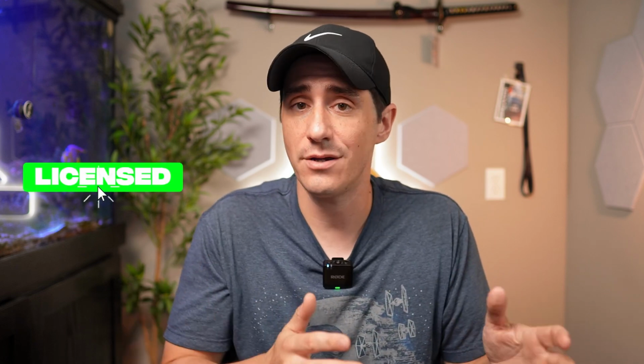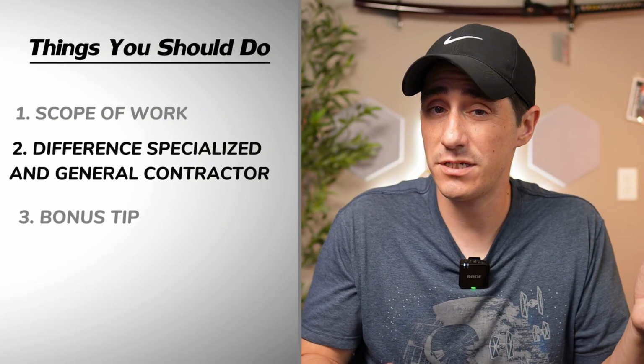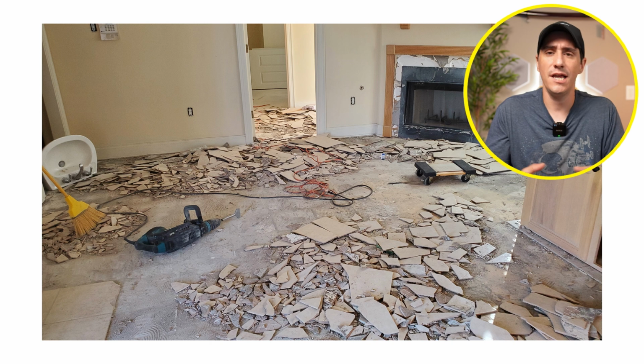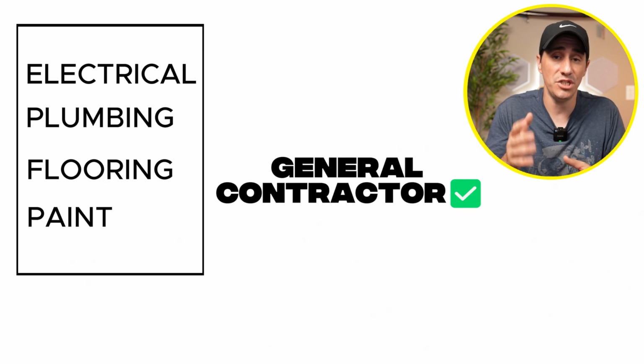Sometimes your project is gonna absolutely require you to hire someone who is licensed and insured because you're gonna need permits. Another part of this is you need to know the difference between a specialist and a general contractor. If you're gonna do a full gut job, taking everything down to the studs, you're gonna need to replace electrical, and plumbing, and flooring, and paint, the whole thing, you're definitely gonna wanna go with a general contractor.